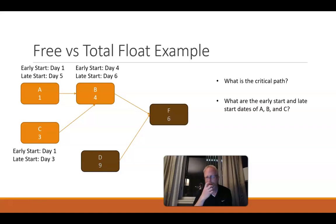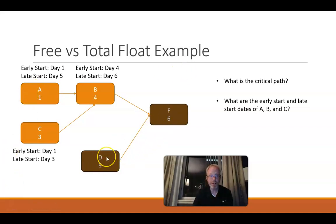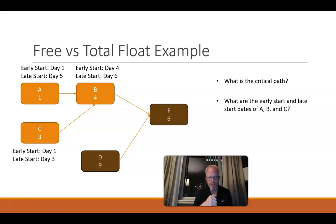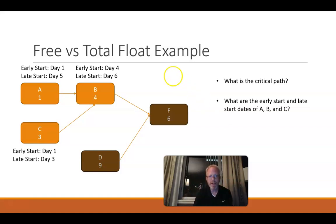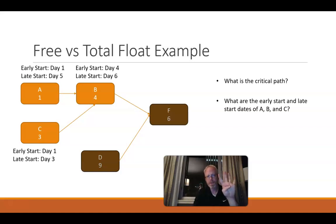Now for the late start dates, we reverse engineer from the critical path. The critical path is 15 days — 9 plus 6. Task F is six days, so it could start on day 10 and run through day 15. That means B must finish at the end of day nine at the absolute latest. B takes four full days, so counting back: days six, seven, eight, nine — the late start date of B is day six.